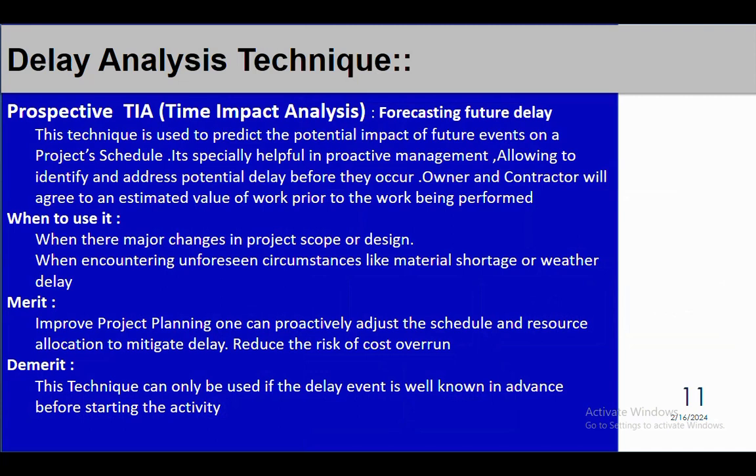The demerit of this technique is that it can only be used for delays which are well known in advance. Suppose you started the activity and then you come to know about some delay event, you cannot use this technique. So this technique can only be used if your delay event is well known in advance, or for future delays.